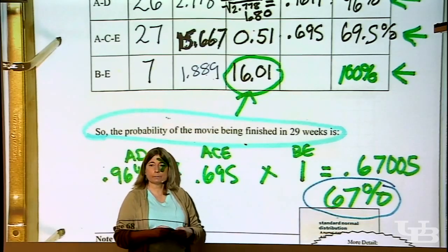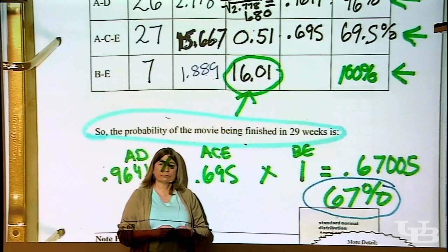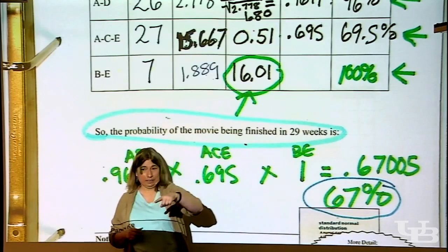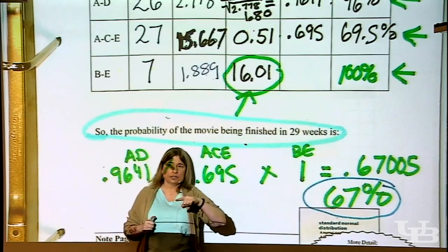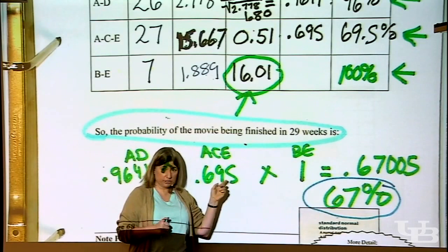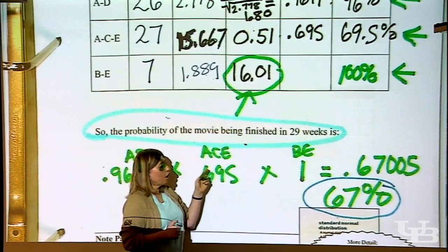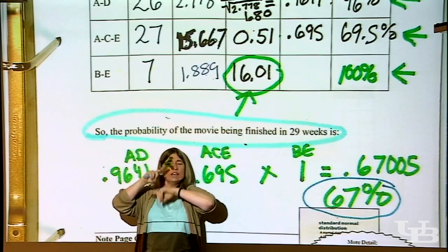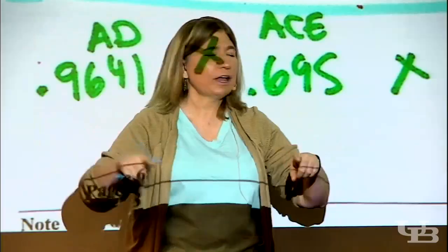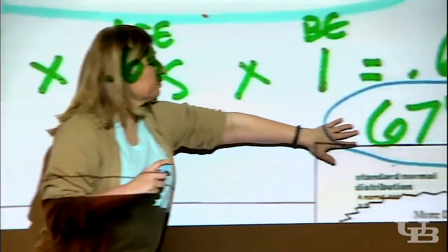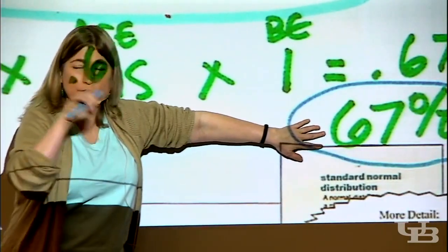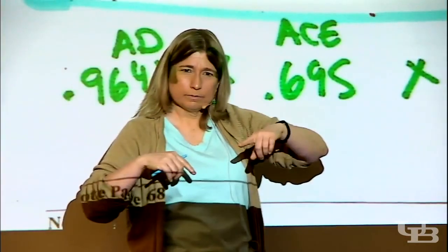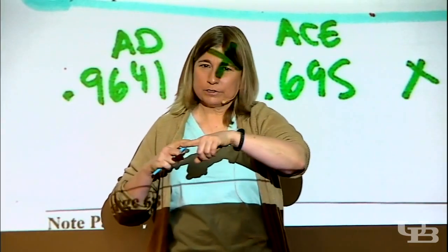Yeah? Is it changed at all if all the paths have individual parts? Actually, what you're sensing is that there's a generalization here that in reality is one of the criticisms of this technique. If none of the paths crossed, we say that they're independent, and what I just described to you wouldn't hurt us. But these paths, some of them cross. They share certain elements.